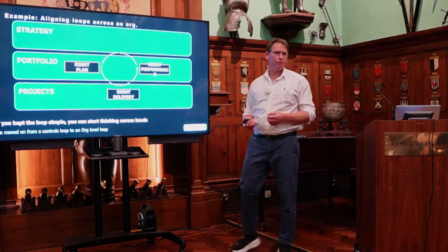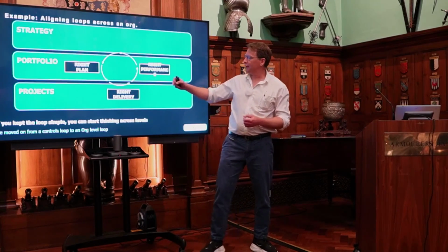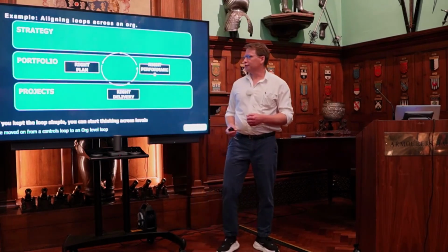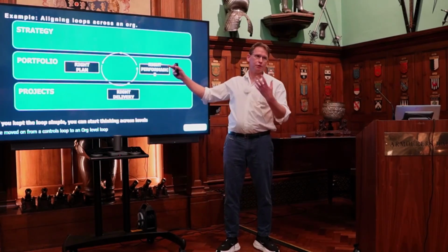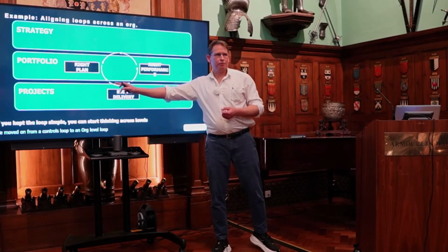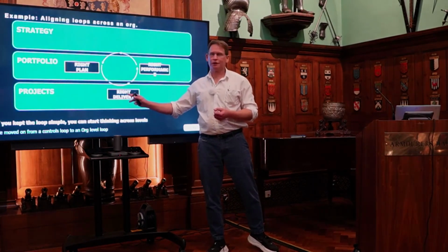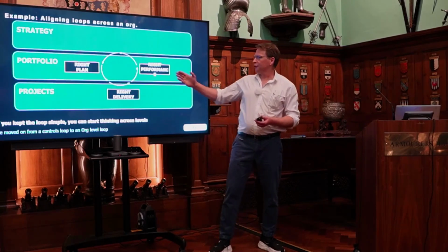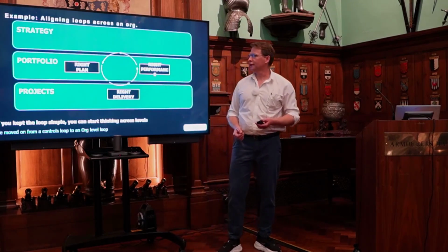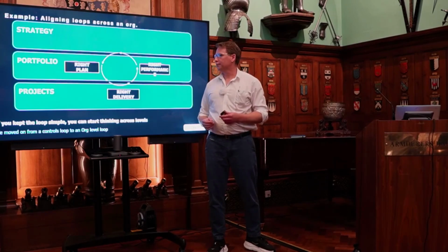So we still tried to keep the loop simple. It's just a 3-thing loop. Just look at the loop for a second. There are many different ways of doing this, but you had a plan at the portfolio level, and you were trying to match that, at a management accounting level, with what was popping out in terms of performance. And then, this is often the bit that gets missed: how are we tracking that into the people, and how are we supporting the people who are actually delivering that? So you can have a very simple loop, and this is obviously a slow, essentially quarterly loop. But it does give people the structure to start planning their own loops.